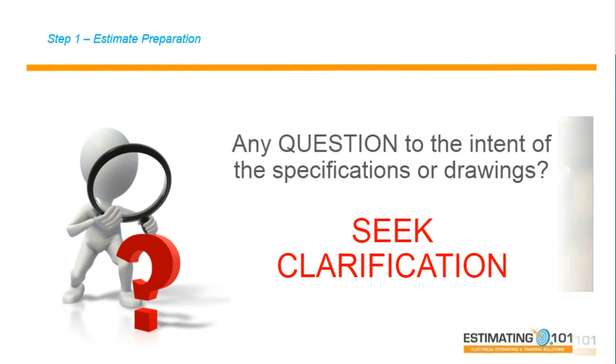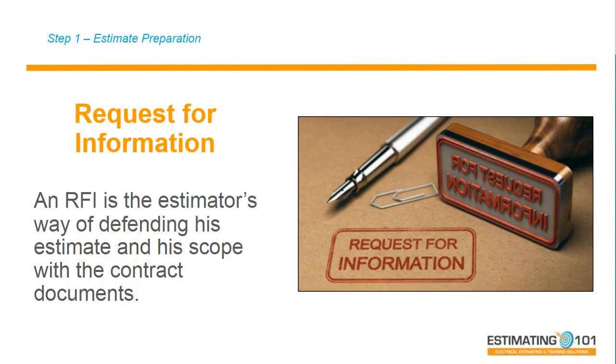And we do this with an RFI, request for information, and that's the way of defending your estimate and making sure that the scope of your work and your estimate is within those contract documents. Many people have challenged me and said, estimating is guesstimating. I do not accept that estimating is guesstimating at all.